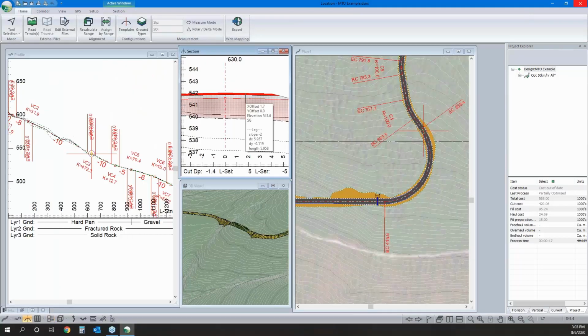So we've got a fixed fill slope angle, fixed width for the most part. So really, for keeping track of it, it's not very hard. We can do it in the software, but it's just as you expect. The real benefit of using design software is keeping track of things like your subgrade: how much material you need to build that in your fill sections, and how much material you are excavating in your cut sections. So that's kind of an overview of MTO.